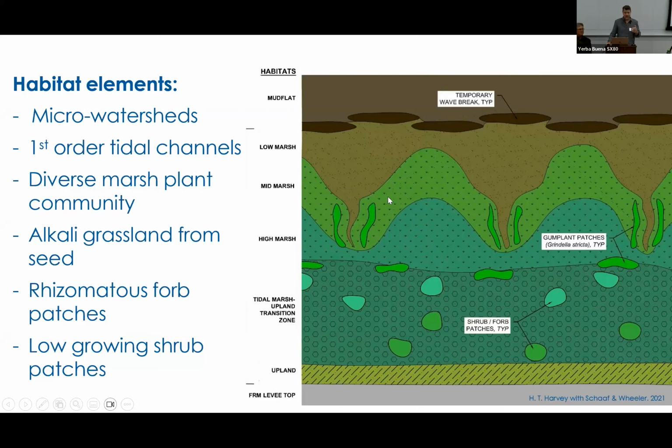We would do plantings of species that don't recruit naturally on their own to create a diverse marsh. And above the high tide line, the idea is each year as soil comes in through the free dirt market and you get up to grade, you have an opportunity to revegetate without a large weed seed bank, especially if this is subsoil that's come from a construction project, maybe feet down. So the idea is once it's in there that very year, take advantage of it, seed it, and plant it, and do weed control to get a native plant community going and kind of work your way along the transition zone.